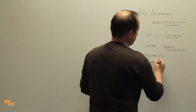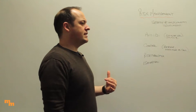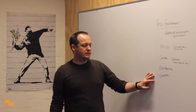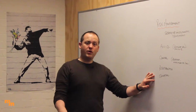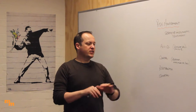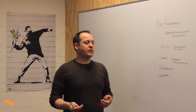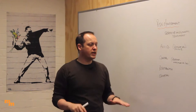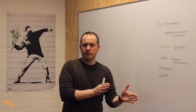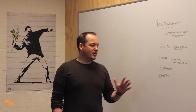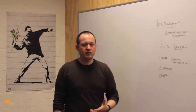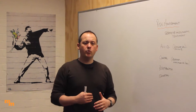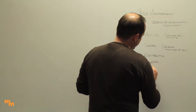Risk isolation means putting the risk somewhere else so it doesn't affect people. With cars, we put cars on roads and people on footpaths — we don't have them sharing the same space. We understand cars are a risk, so we isolate them from people. We put expressways and highways where people drive fast away from humans walking around. In cities, here's the road and here's the footpath and they shouldn't cross. In a company, this could mean keeping plant machinery away from workers.